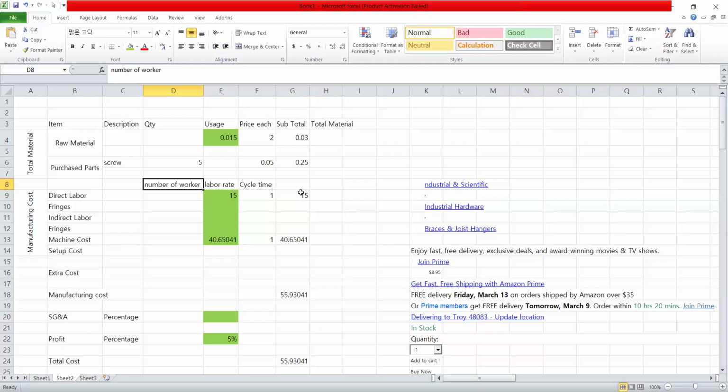I'll give you an example. PP is almost like $2 a pound, say about 2.3, 2.4. If you go to the cheaper version, recycled with 30%, then it will be a little bit cheaper, but it loses certain properties.